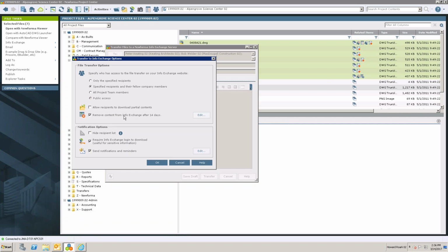The problem with Dropbox is that people love to put things on FTP sites, Dropbox accounts, whatever, but they never go in there and remove anything. So if you have a living document that changes, and someone pulls the old version of that because it's still on the Dropbox, that's an issue. So what we do is we automate that and we say it's only going to sit out there for 14 days. After that, it will be inaccessible because most likely it's outdated at that point.